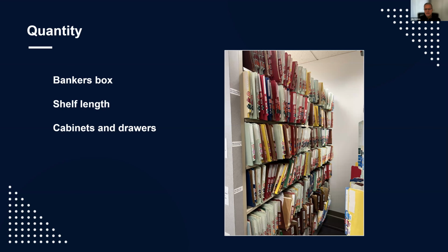Yeah, the only thing I'd add to that is these files in particular are legal size. Most of the time we're encountering letter size files. So when these are transitioned to boxes, they will occupy the box sideways. And so we'll get a foot of files instead of 15 inches. That will affect the number of boxes.